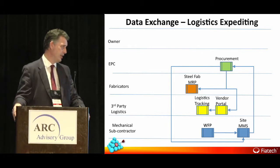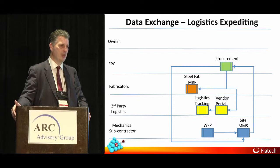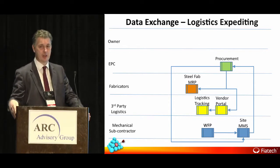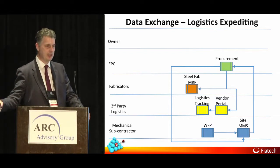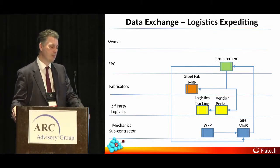We see the biggest return there is that the guy doing the work packs, he will build the virtual work pack, he will check that against the materials in store, and he will either give it a green tick that the guy can go and move forward with that work pack, or he can hold it back because it's incomplete. We may decide to move forward with an incomplete work pack, but at least we know exactly what scope is there or what materials are there or not there.